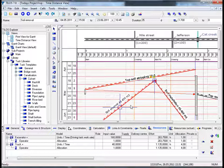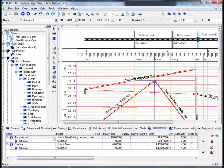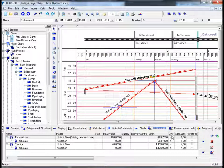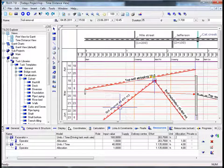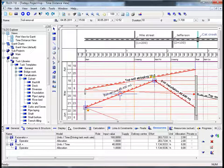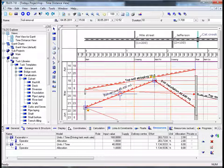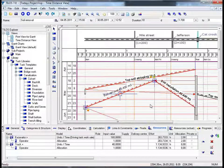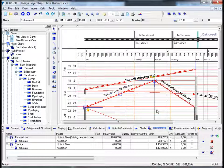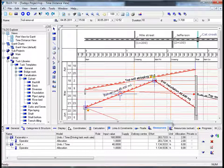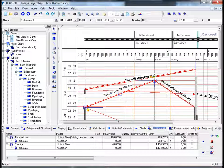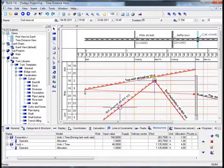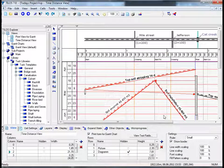If we move back down to the excavator and if we want to change the number of excavators to two as opposed to the allocated one, again insert the number two and hit the return button. We can see now that we require a total of eight trucks including the driver, the operator. And again we can see that in the main working area above, Tylos has graphically updated the working schedule. Before we proceed to the next part of our tutorial, let's change the data in the resources column allocation of the details toolbar back to its initial state to update the working plan accordingly.